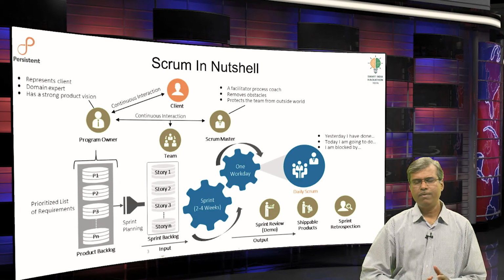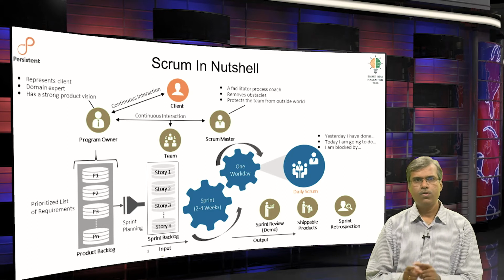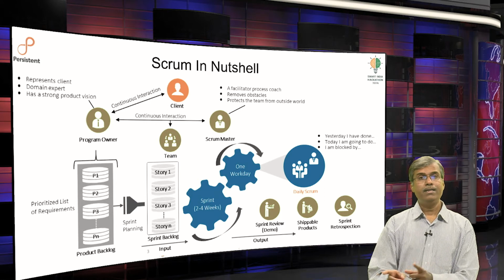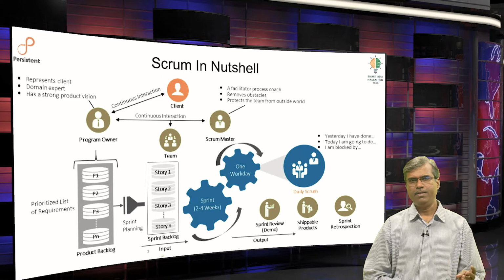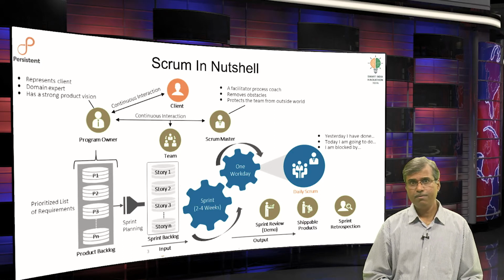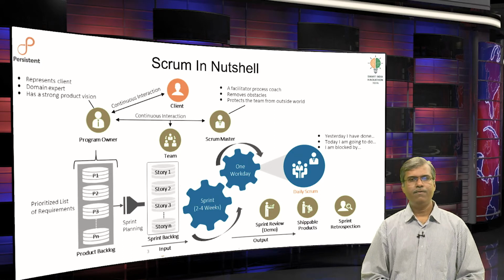The user story format reads as: I as a user want to do something so that I will get a benefit, right. So, it is a 3-part, one single line statement, which says how a user story should be written. Isn't it simple? Let's take an example of a user story.